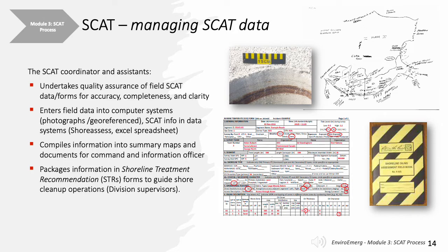Most important, they have to interpret all the SCAT field data and write it into a shoreline treatment recommendation form that is totally understandable by operations. These are operations' next day work assignments. All these deliverables have to be prepared and presented according to the Incident Command System operational period schedules, by way of meeting with the planning group, operations, and command.